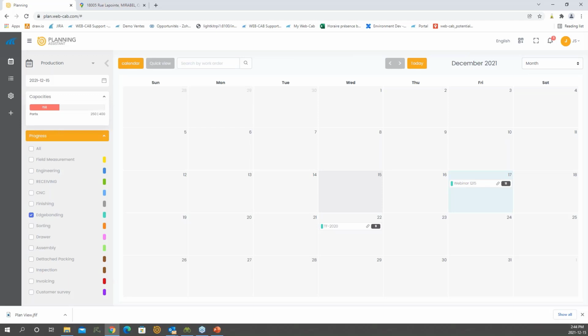It could actually move all of the other chained events, and you get to decide which ones are chained to it. It could automatically move those forward or back to accomplish the dates that you have set. So you get the choice of deciding which of these stations or which of the calendar events you want changed when you make a move that is different than just the automatic recipe. Jonathan, did I say that okay? Yes, that's good.